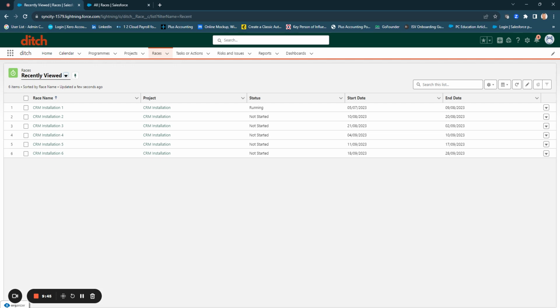Here we're talking about projects. Projects are very different. We don't have to have that cadence of tasks going through. We need to break down our projects into chunks of time that we can manage the work within each of them. It might sound complex to some, but actually most people already break their projects down into months. You do monthly highlight reports, you do monthly reporting. I quite often recommend that when you set the races up, you just set them up as monthly races anyway, and you can always edit them later.